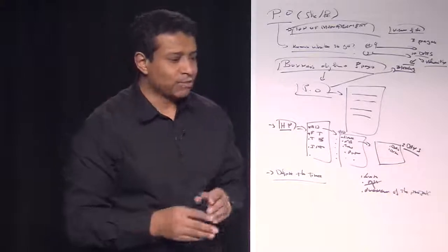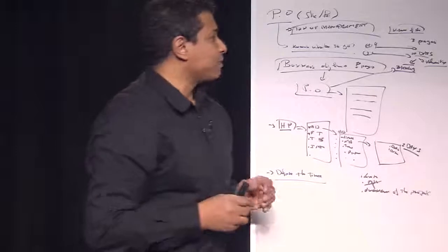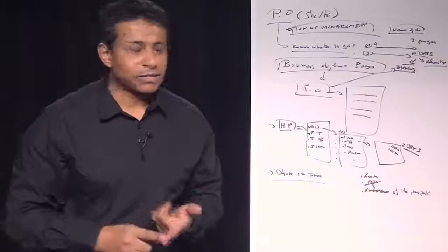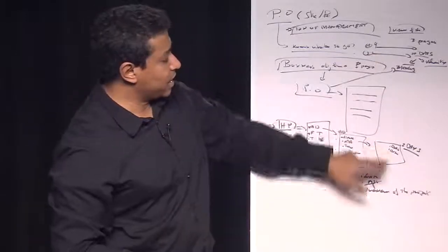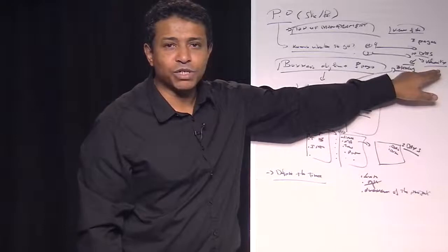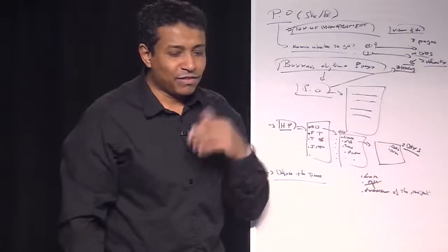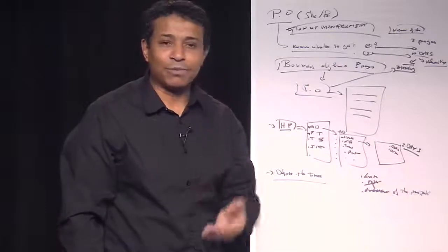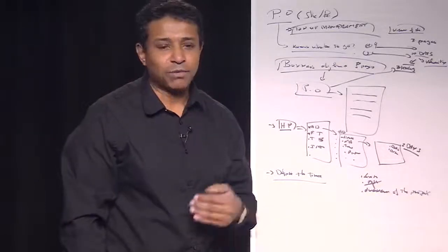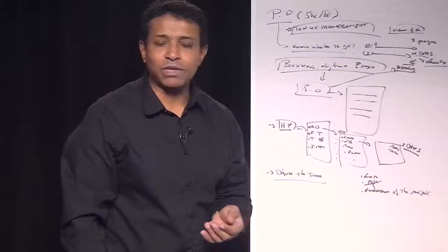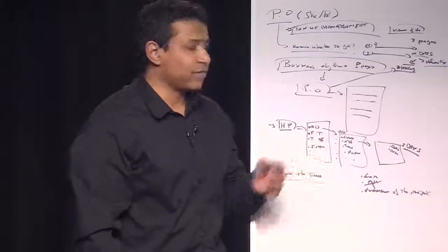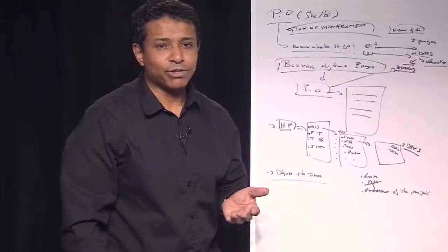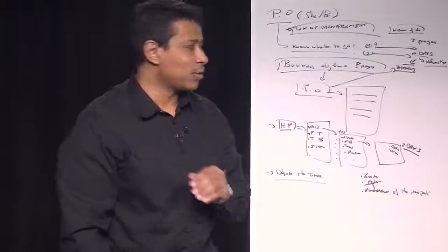So to sum up, in a concrete way, a product owner is defining the number of pages, defining the number of days, but for defining the number of days, he's got to know the velocity of his team. Let's say I will explain that in detail later, but let's say I have 10 people working on 2 pages. I know that I will take, let's say, 20 minutes per person. So I say, okay, my velocity is 1. So if I get some more points, they won't be able to do it. But I'm going to explain that later, don't worry.